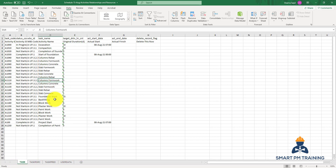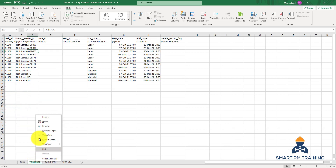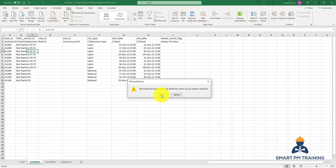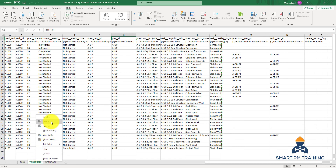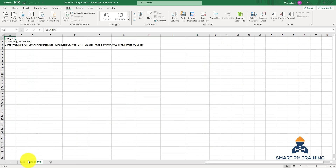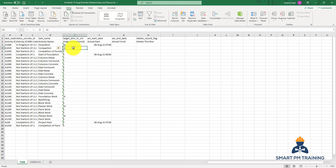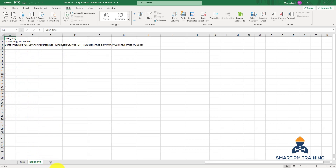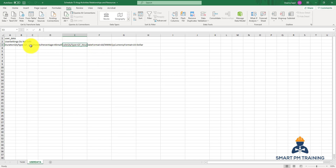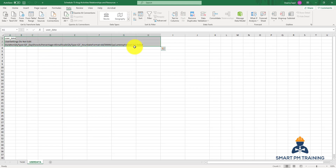Let's import this information back into Primavera. I will import only Activities, so feel free to delete the relationship and resource sheets — only Activities will be imported. I changed the duration of Compaction to 10 days instead of 7. Also note there is always a tab called 'User Data' — keep it as it is, do not change anything. It has to do with the format for how dates and currency are presented.